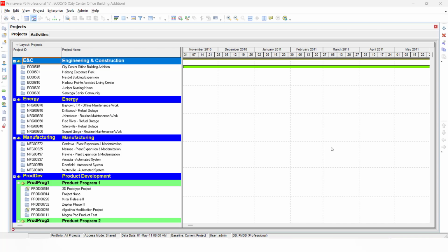From our previous tutorial, we have learned how to edit or adjust the calendar working days. For this tutorial video, we are going to discuss how to edit the calendar working hours. In editing calendar working hours, it is better that the working hours per day are all the same and have the same start and finish time.